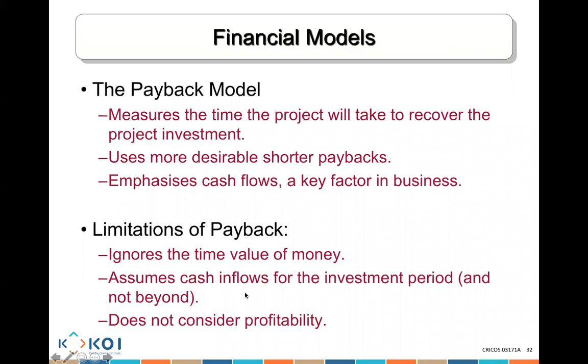If you talk about the payback method, it looks, for example, at how long it is going to take for me to get the money back from my investment. What we do is choose the projects that are going to give me my money back in the shortest possible period of time.